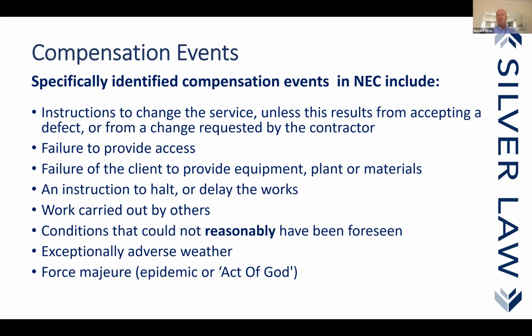So we're working from a contract that provides a baseline for assessing extensions of time, and relevant events, relevant matters, variations, in other words, a compensation event, which is based upon dates not being met in an accepted program where there is no accepted program. And you can see what is going to be the problem. You're not going to get agreement. The job progresses on with an ever-growing list of alleged compensation events by the contractor, not agreed by the project manager, an ever-growing dispute and disparity between what is being applied for and what is being paid.